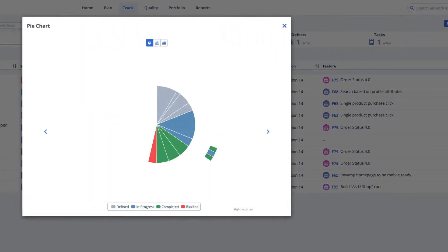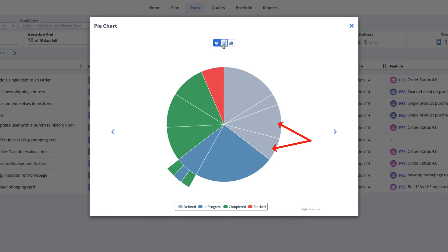Three charts are available to visualize the team's progress. The pie chart provides a breakdown of your iteration work into color-coded states. In this example, the pie slices are stories and defects, and the pie crust represents tasks.